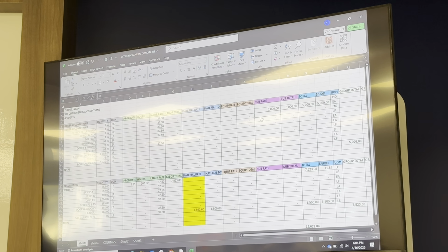And then office rental, $1,300 a month. All right, so that'll cover our office. Storage trailers: this is going to be equal to the duration of the job, in months. And let's say we have 2 C-vans, so duration times 2. Rental on those is going for about $150 a month.